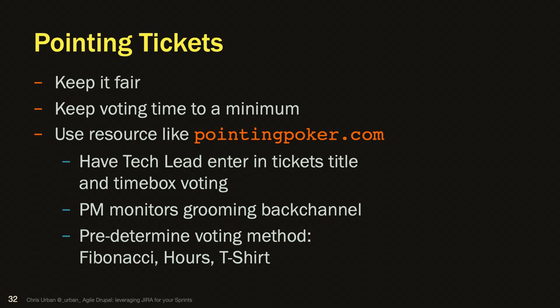The most important thing you need to know is, is it something easy? Is it I'm fixing a typo? It's a one point? Or is it that I'm building out a whole new content type and three views and some weird permissions role, what I see is what displays differently kind of thing. That's maybe 5 or 8 points, right? Something that'll take the full sprint for me to build. You have to have some idea so that you know what your capacity for work is in the next sprint. You should be doing pointing or sizing, right? And that should be done probably with grooming, if you can.